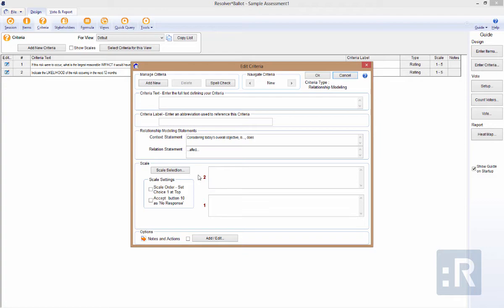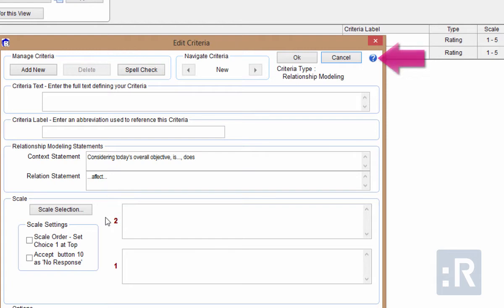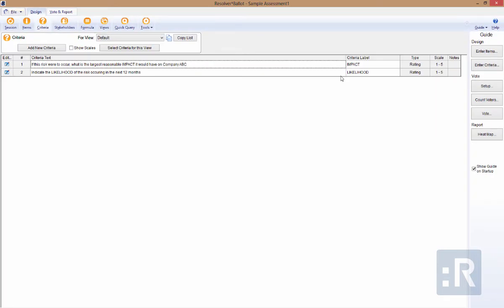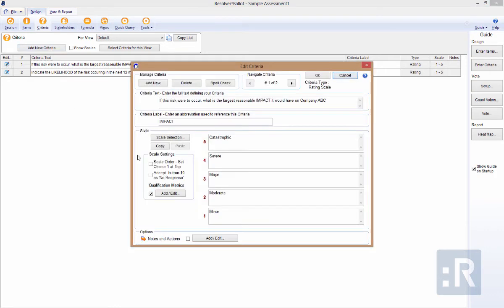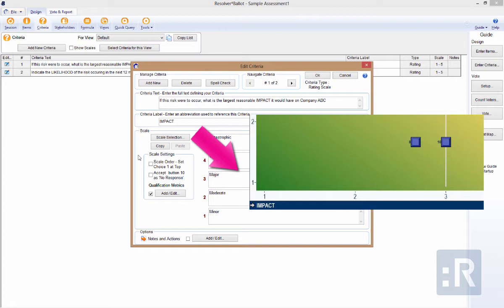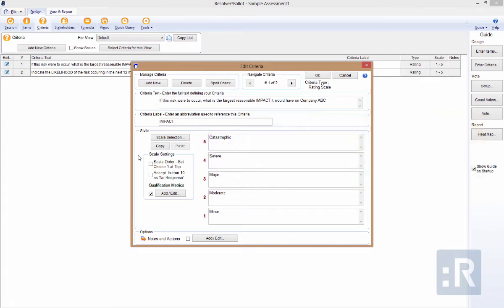Since the setup will vary a little, you can click on the Help button for step-by-step instructions on how to add each criteria type. For our sample risk assessment, we have gone with a rating scale type criteria. For this, we need to enter the criteria text, the label — which will also be visible on our heatmap and charts — and then the scale values, such as catastrophic, severe, major, moderate, or minor.